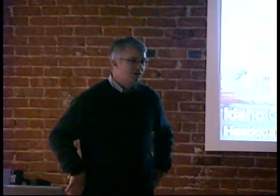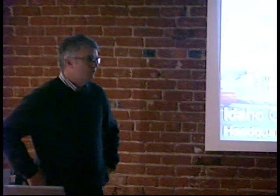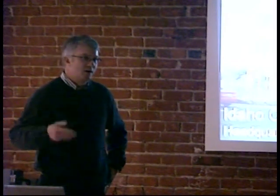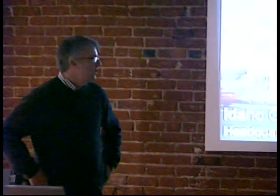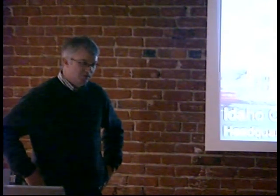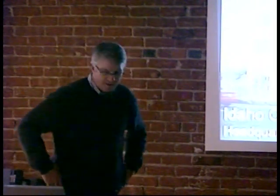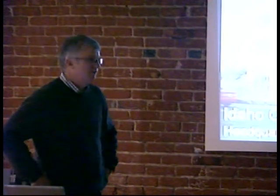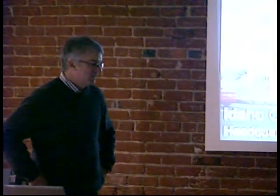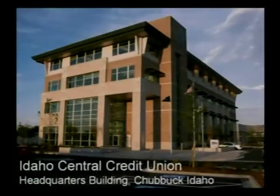As we went through the design process, working with the construction manager, they were giving us updated budgets as we moved along, and of course the number kept creeping up, but the owner was okay with that. We did very little value engineering on the building. The building pretty much originally looked like it does today during the schematic design, as I showed you on those original elevations.